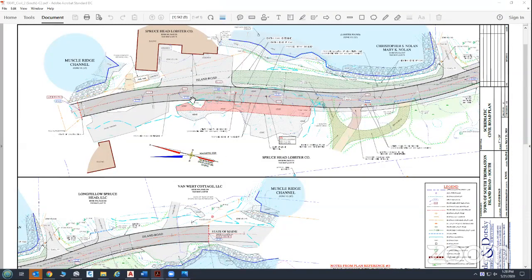When you do the preliminary and schematic, you're just kind of looking at it from 100 feet away, and you're trying to dial into something to make sure that you have it covered. Then you start doing the design phase, which we're in the schematic design phase, to try to assess where that needs to go, and then you go back to your preliminary and final designs before you can actually start looking at revising construction estimates and kind of putting that in place.